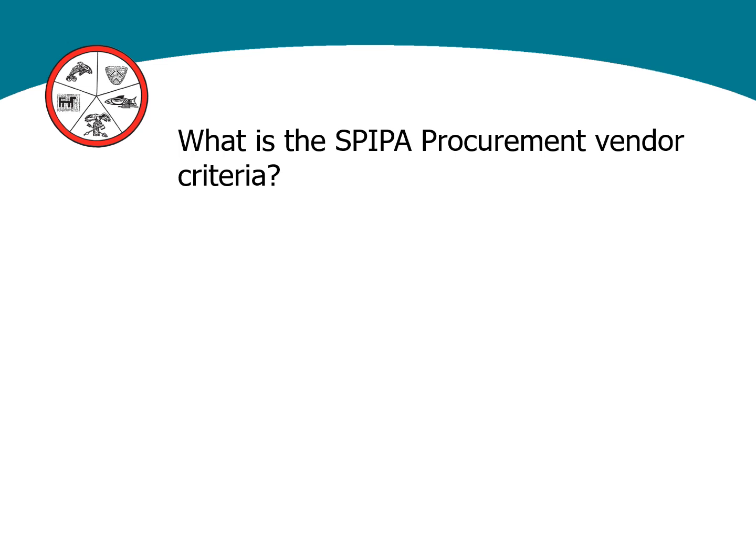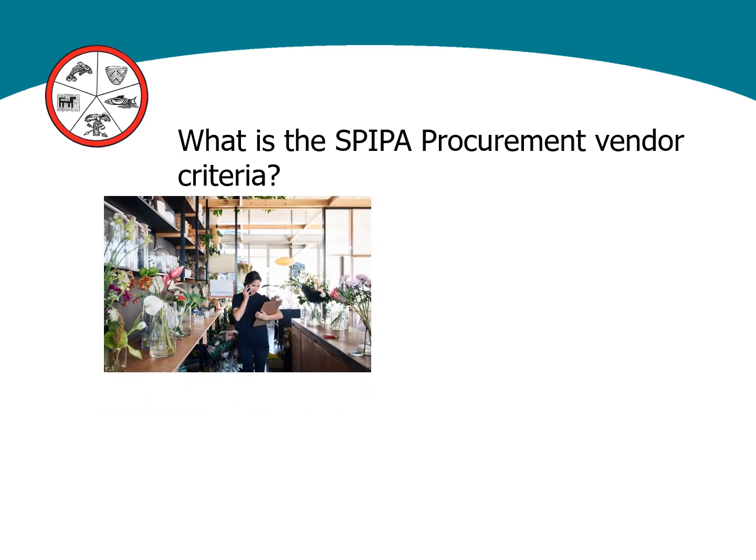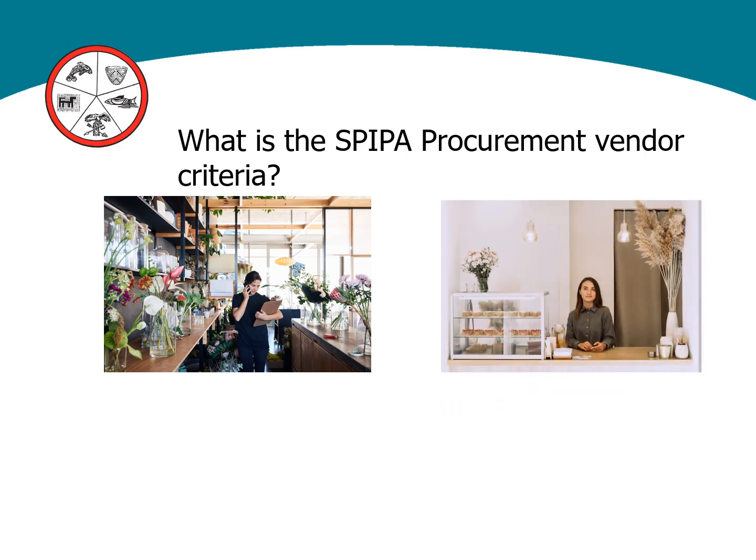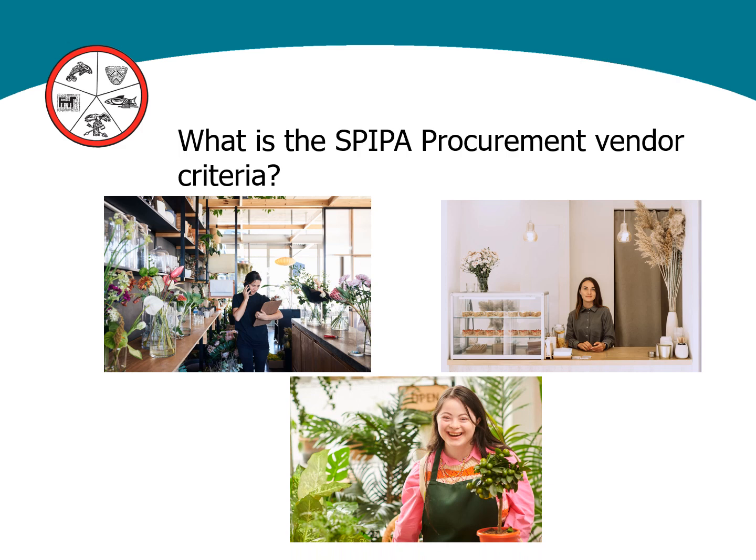SPIPA has an extensive list of vendors that work with our programs. We have legal requirements for some of them that require certain information. So all new vendors are enrolled through the SPIPA Fiscal Services Department. Your procurement can be quicker, maybe even easier, when you use an existing vendor that will accept our purchase orders. You can get the list of vendors from the Fiscal Services Department, and the Fiscal Services team can help you enroll new vendors into our procurement system.